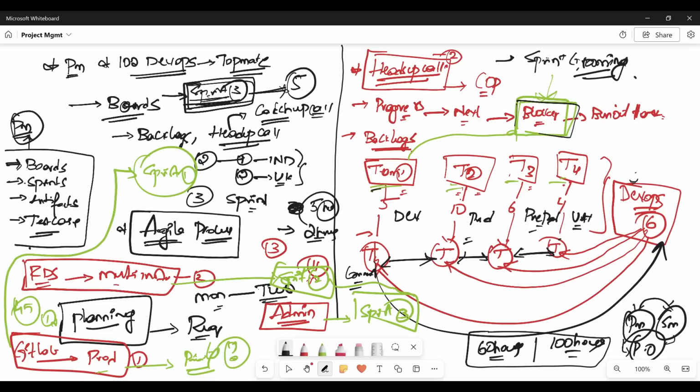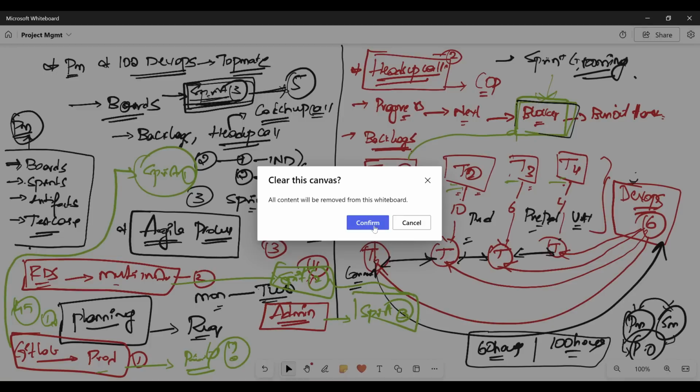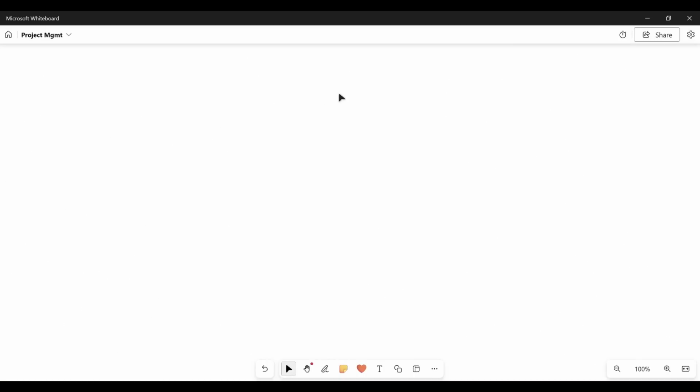All right, in such cases the team evaluates the feasibility. If the task cannot fit into the current sprint, it will be deferred to the next sprint, guys. All right, this is actually an agile process. If anyone doesn't know this, please try to understand and also try to watch a video on YouTube, guys. Just type agile in 10 minutes, you're going to get one video which has 3 million views. I cannot show the video here now because my screen was completely laid down on the table, I was just writing on the screen.